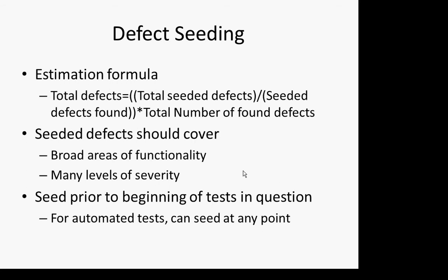Seeded defects, again, should be fairly representative of things. They should be broad areas of functionality, many levels of severity, and you seed prior to the beginning of the big set of tests, okay?